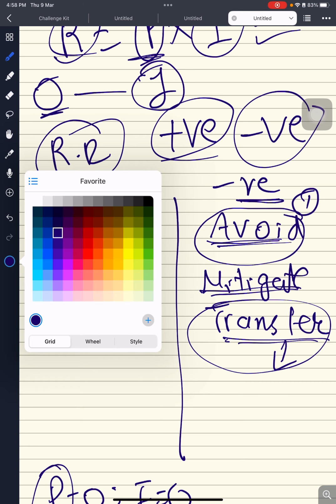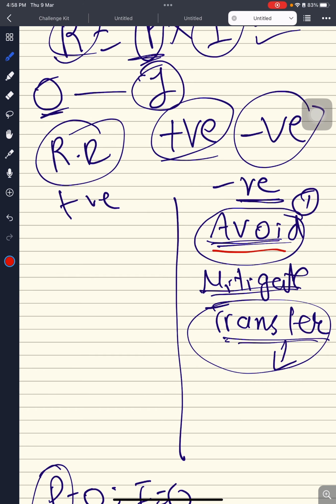Let me give you a real life example. Avoiding the risk can be considered in a way when in COVID we implemented that no one will go out of the home. That was avoiding the risk. Then, after some time, we implemented SOPs. These are mitigating the risk. Transference is like buying the assurance.